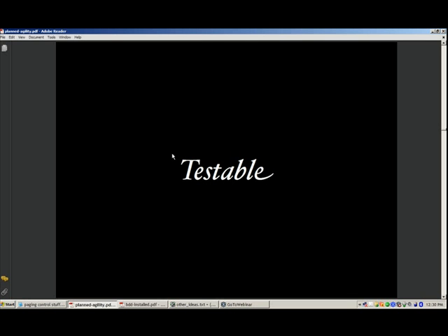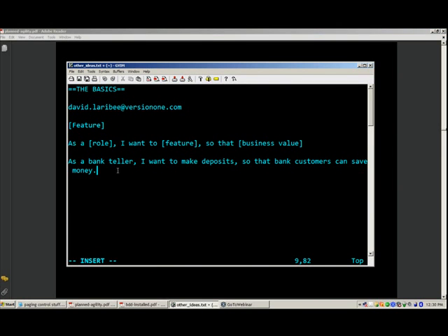All right, so stories are testable. There was a slide, the done stuff. Yeah, we need to be able to make sure that we're done. And in their story, before we go into iteration, we probably want to have some automated acceptance tests or an expression of an acceptance test that we will automate in the course of delivering the story. There are a number of techniques for doing that. Again, I think it's kind of its own topic. I'll hint at a few ideas, but you don't want to take a story into an iteration just like this, right?